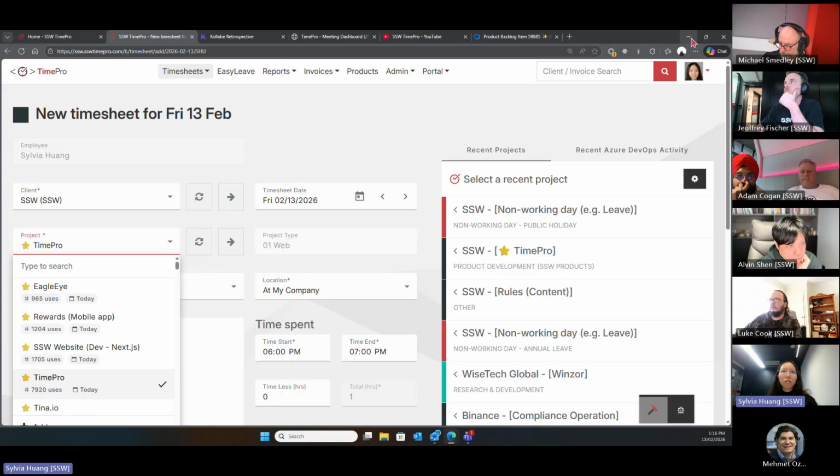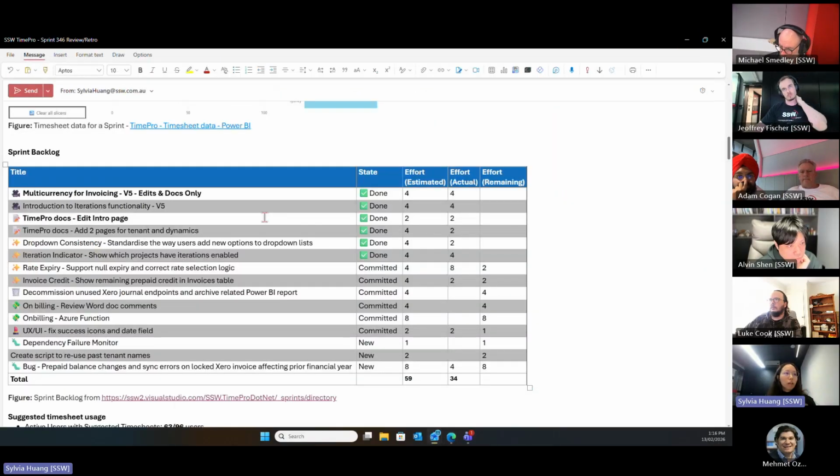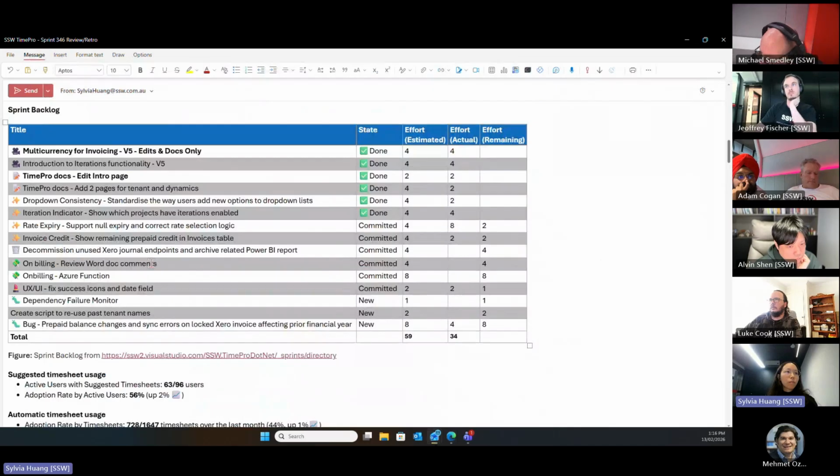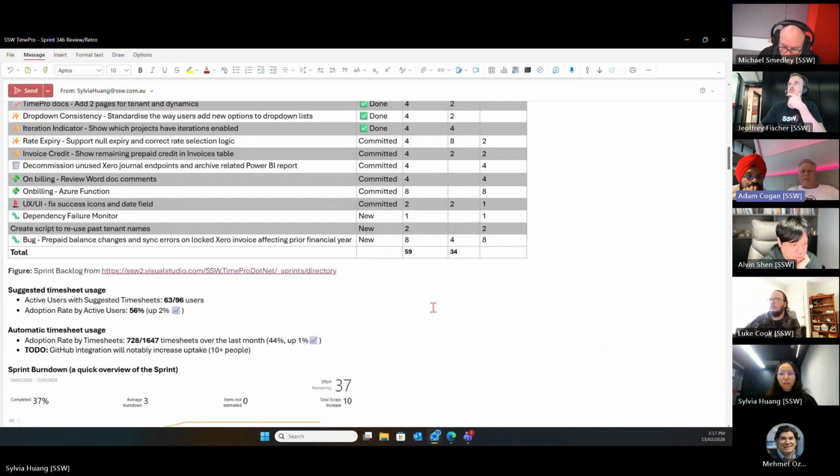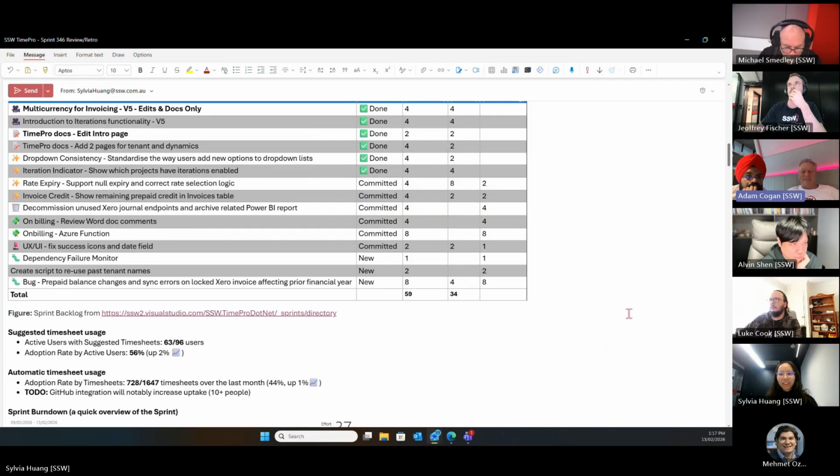Okay. So we are coming back to the backlog. You might notice that for some of the PBIs that we added but didn't get to, these 2 are for the on-billing epics that we are planning to work on next sprint. We have 2 focused epics that we want to get out, and the on-billing is blocking the China tenant. This is why we keep those in our sprints to remind ourselves that if we have capacity, we could start looking at those. That is not very good Scrum, to just throw things in a sprint hoping to remind myself.